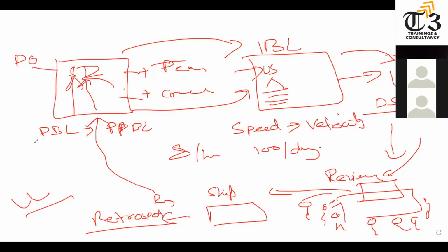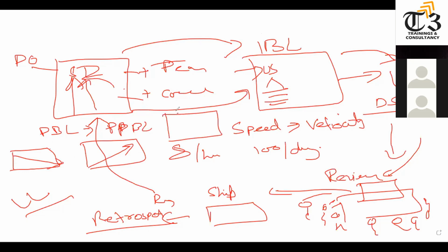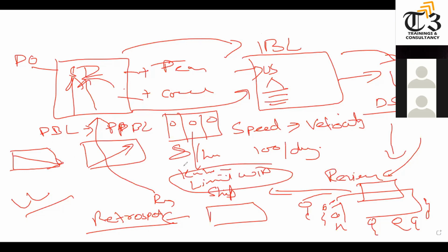To control your activities, you can use information radiators. And what are the information radiators? We have the iteration burn down chart, how much work is remaining, and the burn up chart, how much work is accomplished. Or you can also use the Kanban board to show in process and completed. The main purpose of the Kanban board is to limit the work in progress.